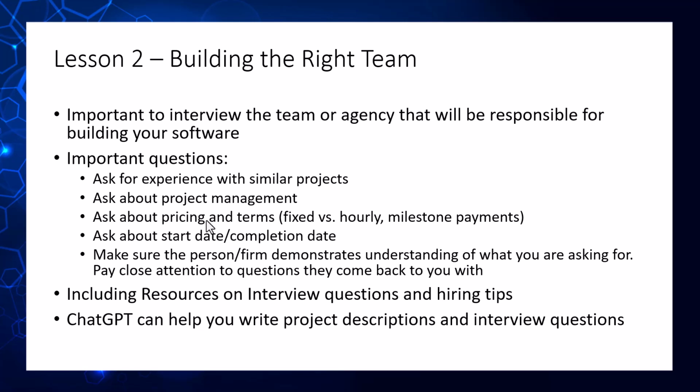Make sure you ask them about their project management experience and what they do. Do they assign a project manager? Are they going to give you daily or weekly updates on what work they're doing? What pricing and terms they have? Are they doing hourly pricing for you, where you pay for every hour that the developer works? Are they quoting you a fixed price, and that's what the cost is going to be, regardless of if it takes them a week or a month to deliver it to you?